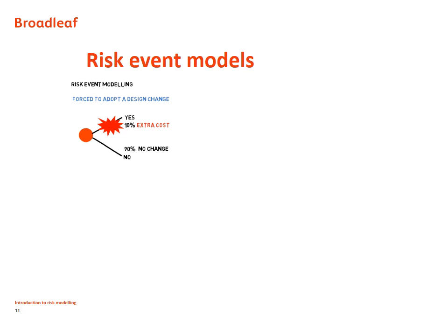But a lot of uncertainties aren't like that. Think about the productivity estimates you've used to work out how much effort will be required to complete a task and how long the work will take. The productivity might be lower, so that you need more effort, and this will increase costs. It's not likely to be an exact amount lower than you've assumed, though. This is the sort of uncertainty where the actual value could be somewhere in a range either side of the value assumed in the estimate.